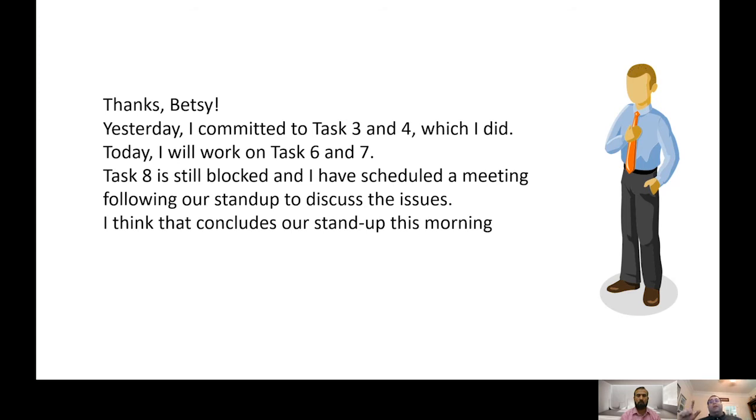Notice that everyone is standing up, which is another best practice. I used to run a stand-up with 15 attendees, and we regularly finished in about 12 minutes. About a third of the days, there was a need for a 30-minute follow-up meeting where issues were discussed, and only relevant people would stay for that. This is a far cry from the painful, wasteful stand-ups that I typically attend on many proposals.